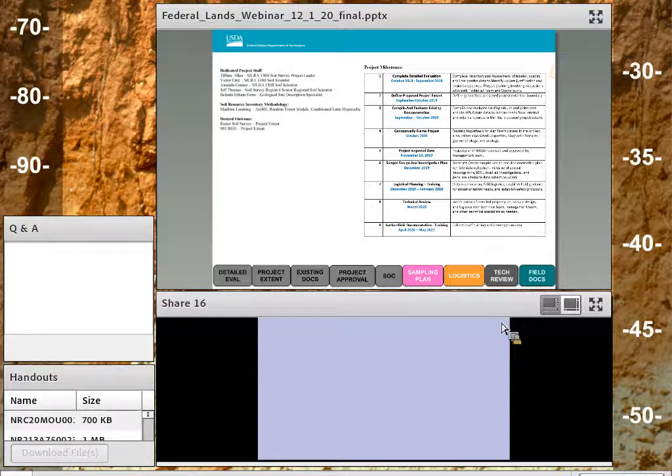As an internal document to NRCS, that is where internally we would list any other resources or staff that we actually would need. And so offices should really be in the habit of putting together an internal document that includes a budget, how many weeks you're going to be out in the field, any equipment that you're going to need on the internal side that we need to get for you, and then any additional staff that you might need, like detailees.